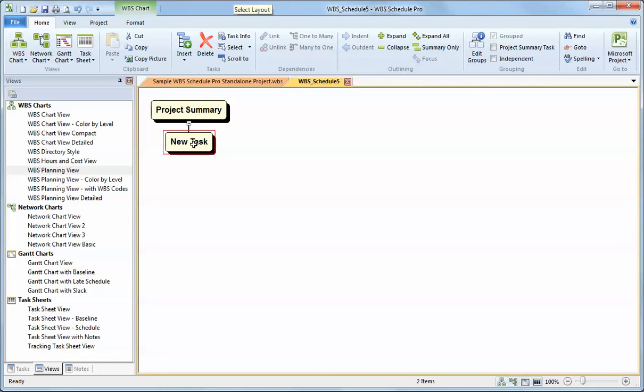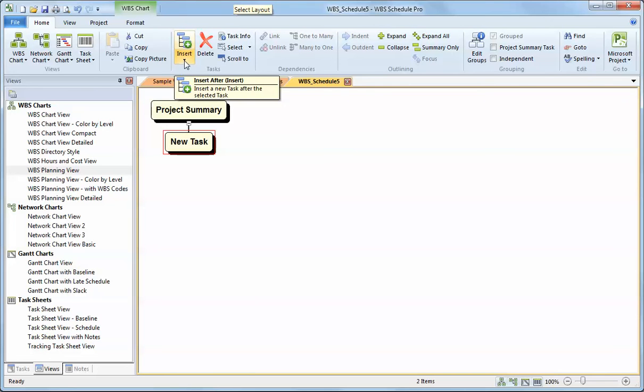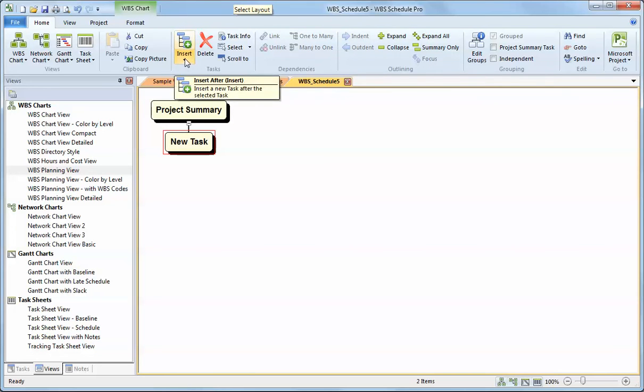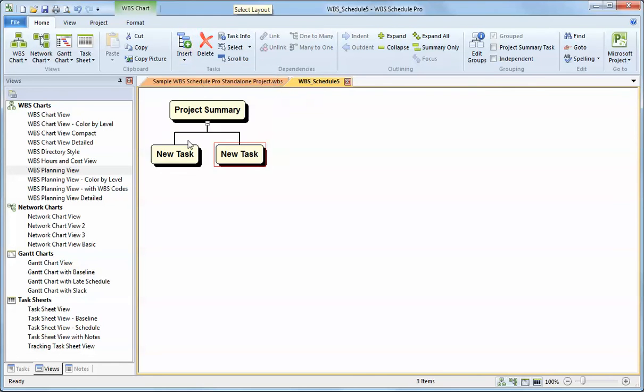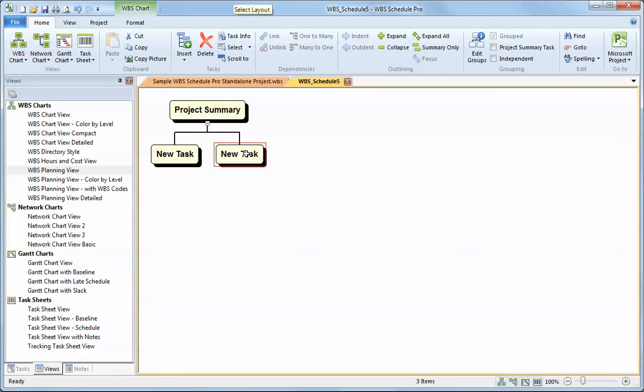I can begin typing this name to represent that this will be the project summary and this is a task below that. A summary task is anything with a subordinate. So as I add tasks under other tasks, they will either be tasks if they're sibling tasks to other tasks or they're subordinate or subtasks if they're underneath a summary. Most everything you do in the program is in relation to the selected task, the one with the red box around it.